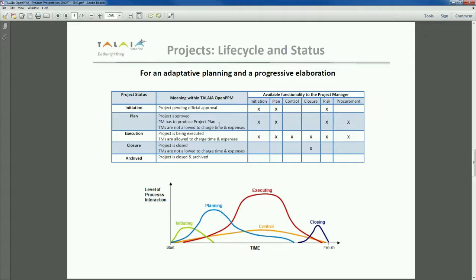Okay, because we understand that the project hasn't started yet. The project manager puts the project into execution when he moves from plan to execution. That means he is kicking off the project. At that time he's only getting the approval for his team through the resource managers, and getting the project all set. Then when he's changing the status from plan to execution, it's really just like doing the kickoff of the project.